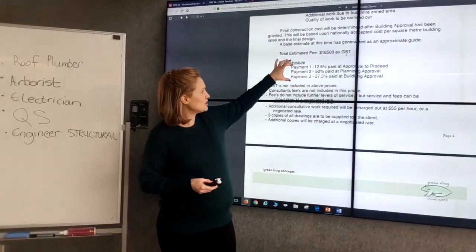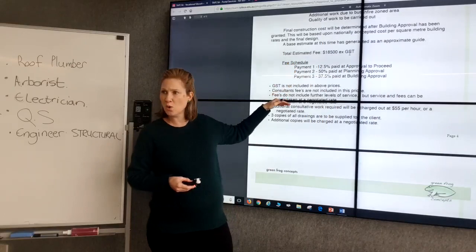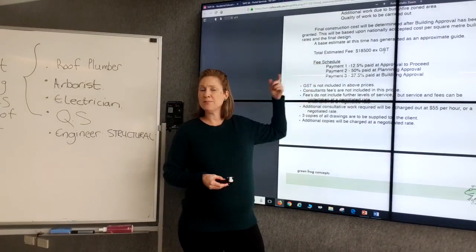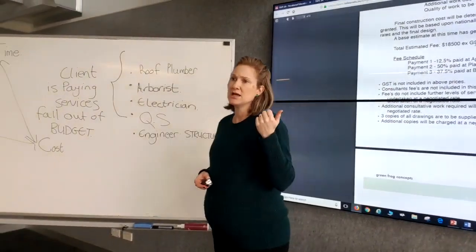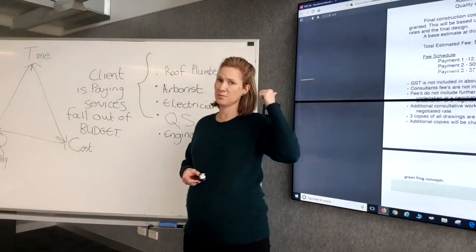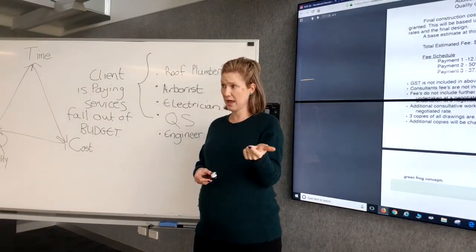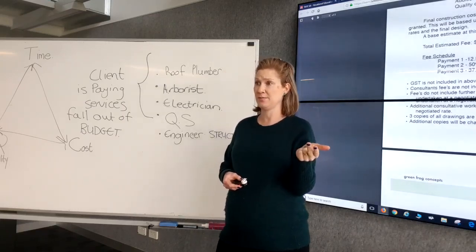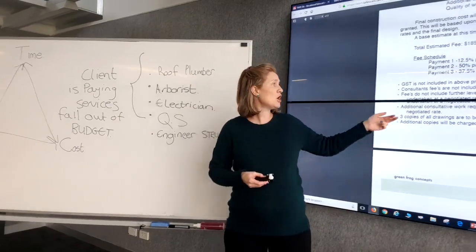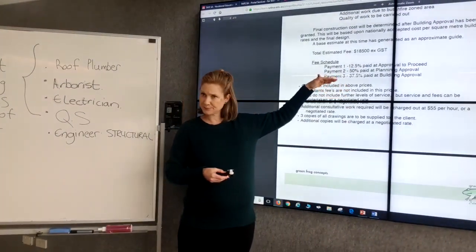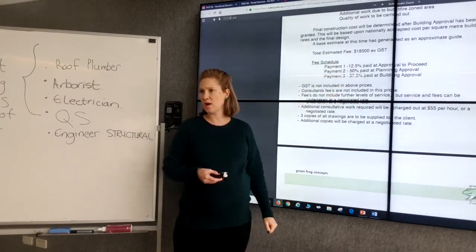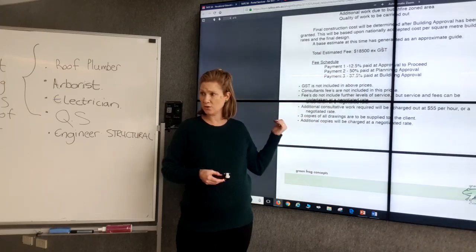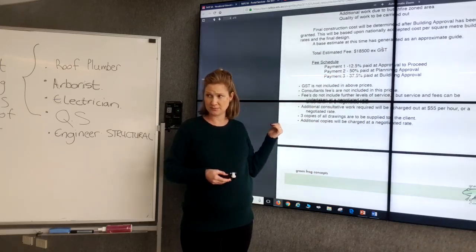You don't have to just mention those 3. You could actually stage it into many more options. But this is what this student has provided here. In business, where I work at the moment, they also have 3 payments. They've got the deposit, they've got a progress payment that the client pays, and then once the project is finished, there's a final payment. Okay. But because we are only dealing up to submitting to council, that's their way of describing that. Okay, now these are available for you to access under your assessment 3. Okay.